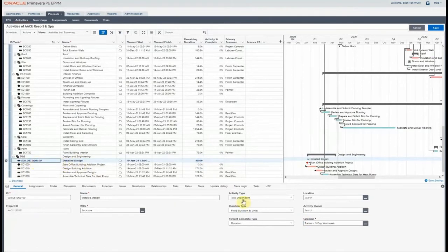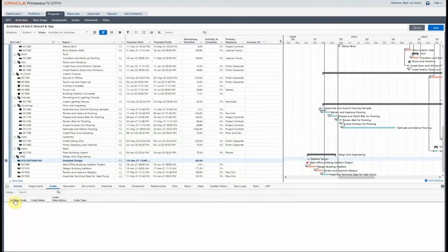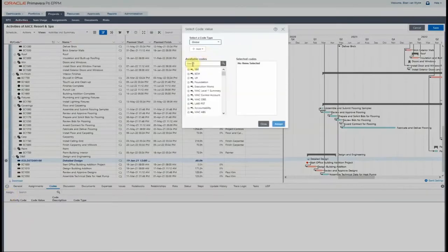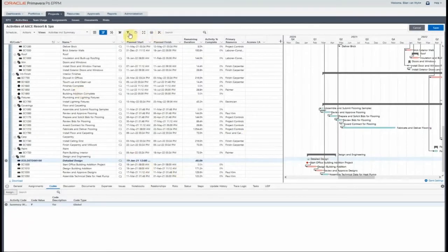And detailed design, in this case you can go and look at the activity type, and there it is, WBS summary. So this is the activity type that we are going to select. Together with this, I also need to go and make sure that this is included in my summary task list. It's a summary WBS. So to assign my filters, remember I was using filters earlier, so I'm going to add it in, and I can assign multiple activity codes here.